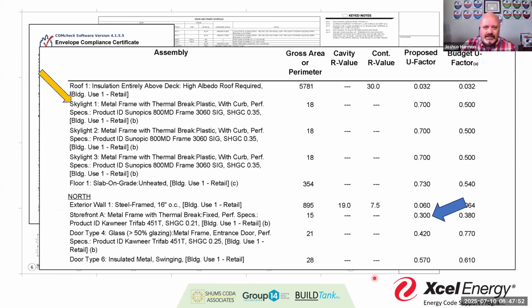And that's, again, where we start to see some of this breakdown, where we may have at one point the team designs a ComCheck, sends that ComCheck over to a separate mechanical design company who will then evaluate, run their equipment calculations, their heating, cooling load calculations, their equipment selection, all based off of that ComCheck. Well, at the same time, a designer team or a contractor comes back and changes something. Again, this is one of those places where we get caught up all the time.